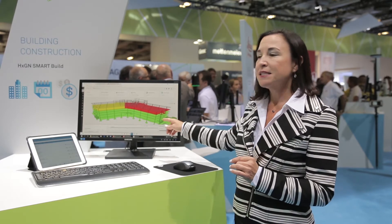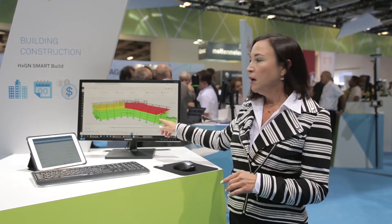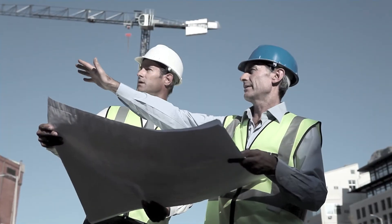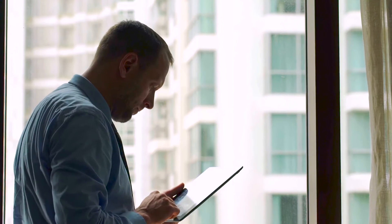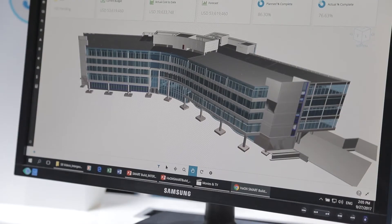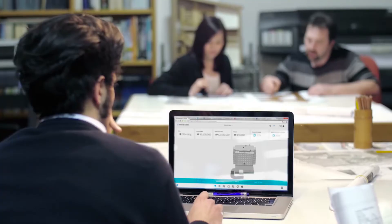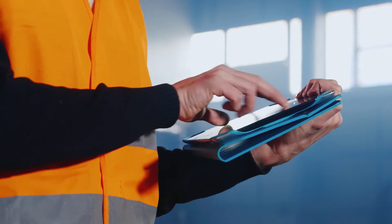In this work package we can drill in and see all the work steps required for that slab. We can see that in this case they haven't even started work. We can drill into the yellow one and see that the first four steps have been completed and they're waiting for QA sign-off. Every level of detail you need to see, you can drill into and get the true picture of what's going on. This is critical because it allows early, well-informed decision-making to keep projects on time and on budget — one of the most critical things to get right in construction today.